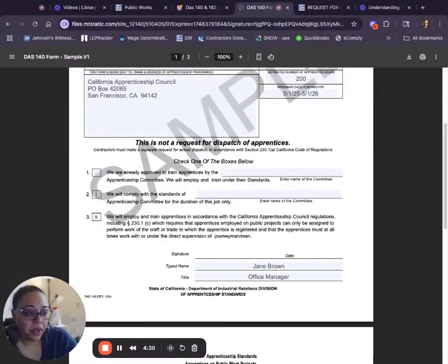Box 2. They're not affiliated with a union, but they're willing to join. I'm going to go back. Box 1. When you complete the name in there, you send the form only to that program. So if they're union and they're with the carpenters, you send it just to the carpenters, local whatever number, and that's who you send it to. I say, please hold caution.